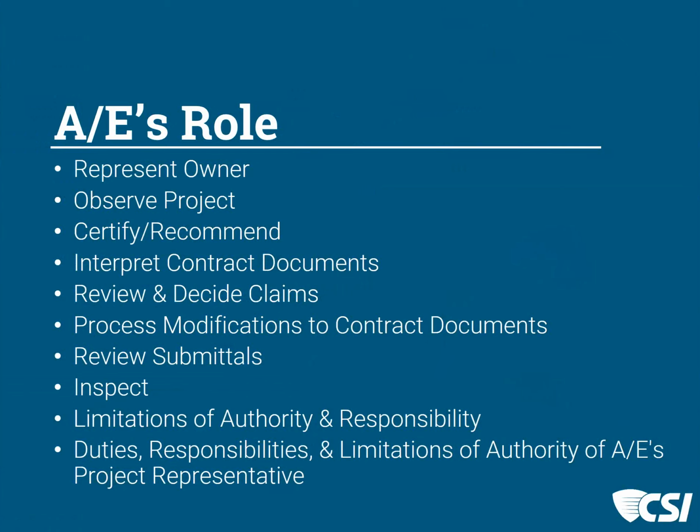We make recommendations rather than certifications, and those are related to payment applications for amount of work in place, or that the project is actually complete and in accordance with the contract documents, which we interpret throughout the project. Remember, it's not a set of directions on how to build, it's a delivery of intent.